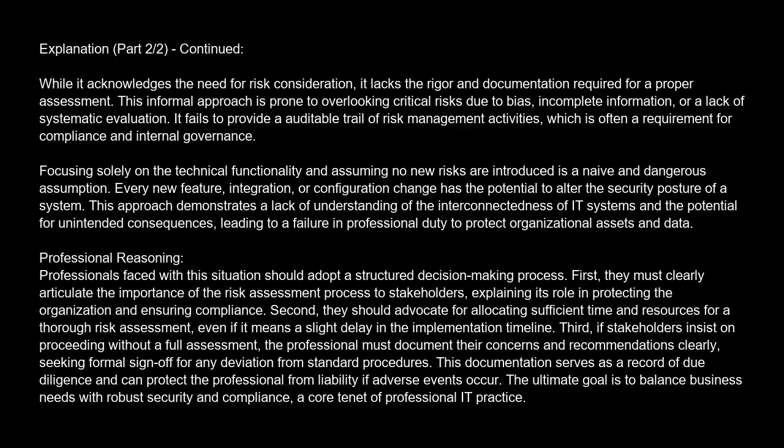Third, if stakeholders insist on proceeding without a full assessment, the professional must document their concerns and recommendations clearly, seeking formal sign-off for any deviation from standard procedures. This documentation serves as a record of due diligence and can protect the professional from liability if adverse events occur. The ultimate goal is to balance business needs with robust security and compliance, a core tenet of professional IT practice.